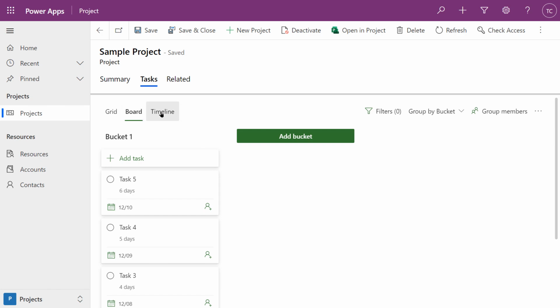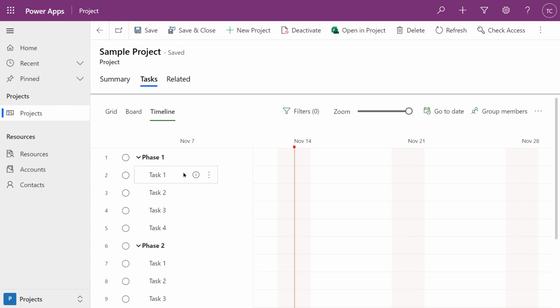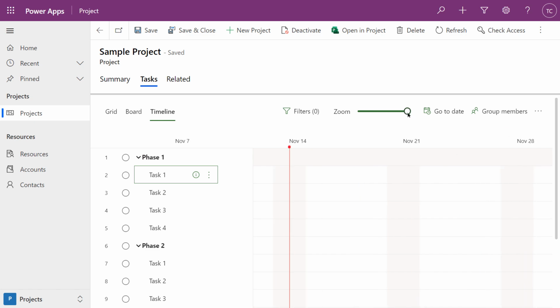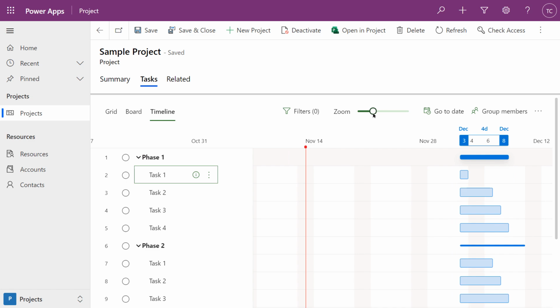We're going to go to timeline view. So in timeline view, when I click on task 1, and actually before I do that, I'm going to just use the zoom button, drag the slider backwards, so I can see these bars on the timeline. Now the width of a bar indicates the duration in days, which is what we use for our task. So task 1 has a smaller bar than task 2, then task 3, then task 4. And your summary tasks show like a line that kind of oversees all of its subtasks.